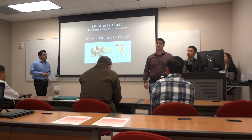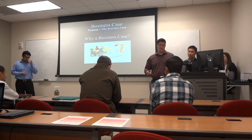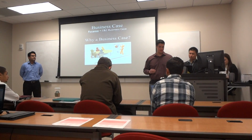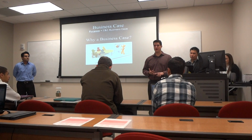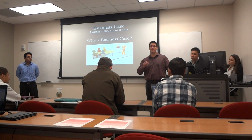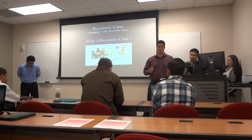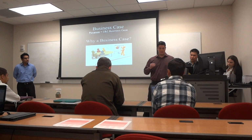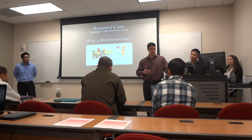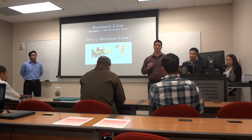Next, I'm going to present the business case that Command & Conquer came up with for treating and reusing flowback. But I would like to start by first explaining exactly what a business case is and what its purpose is. A business case is a written document to justify the undertaking of a project or initiative within an organization by outlining the business need, the expected benefits, expected detriments, and the major risks, and performing an investment analysis on the project. Using a business case, a manager or executive should be able to determine whether a project is worth the investment.